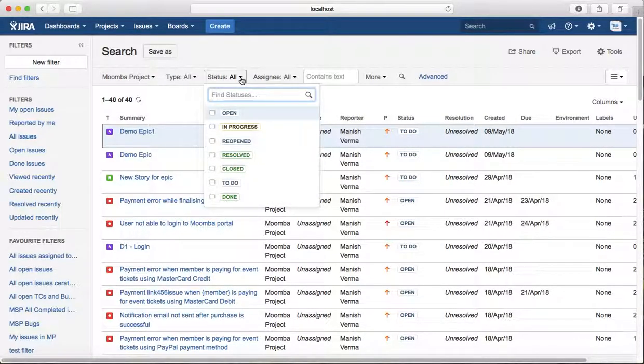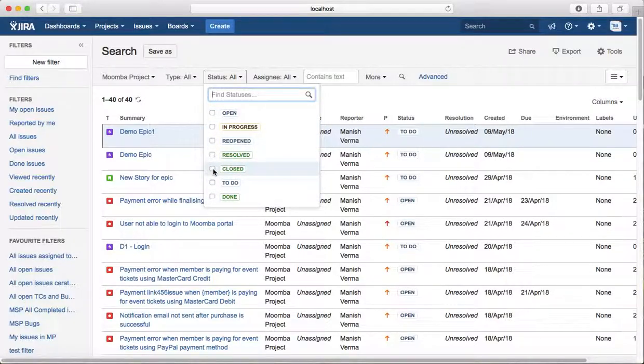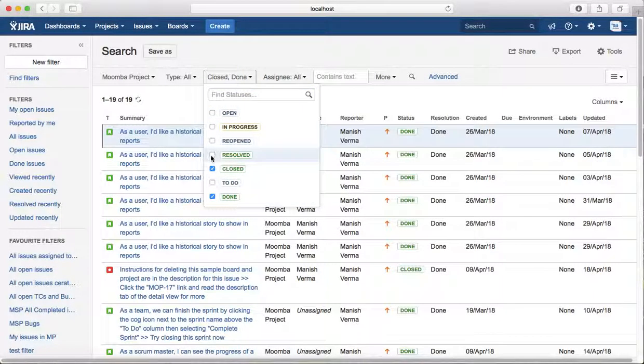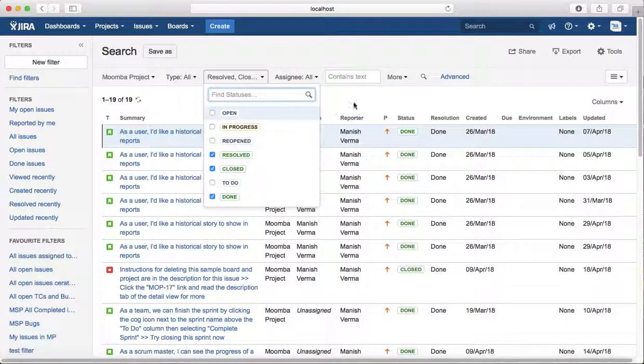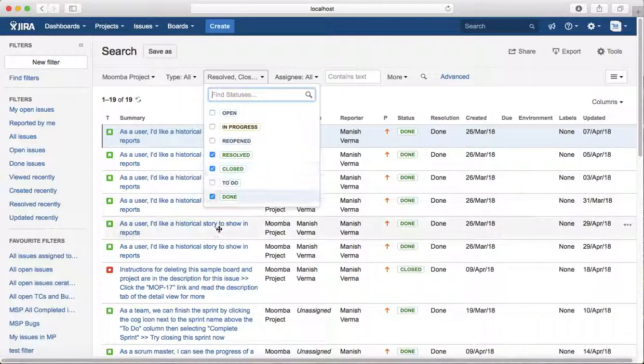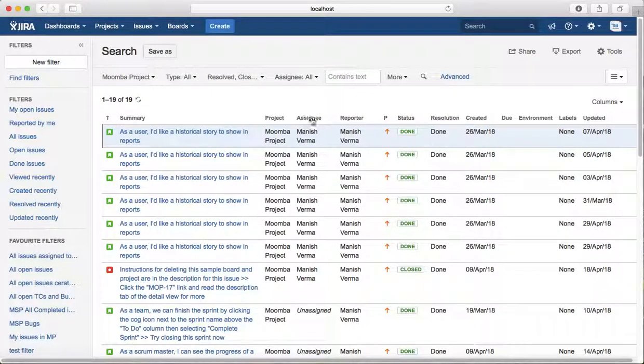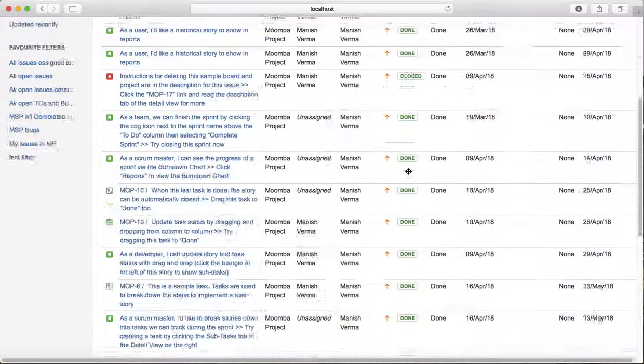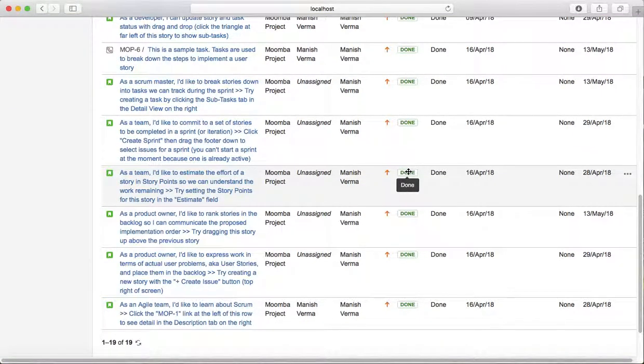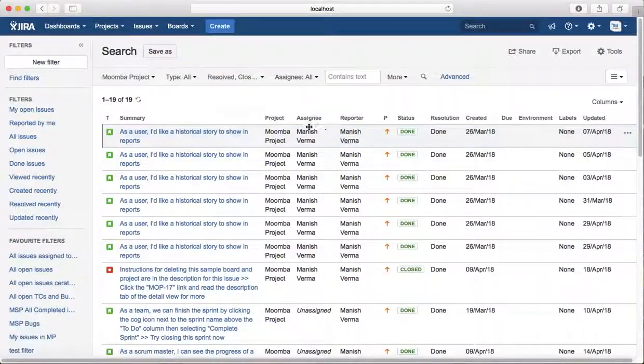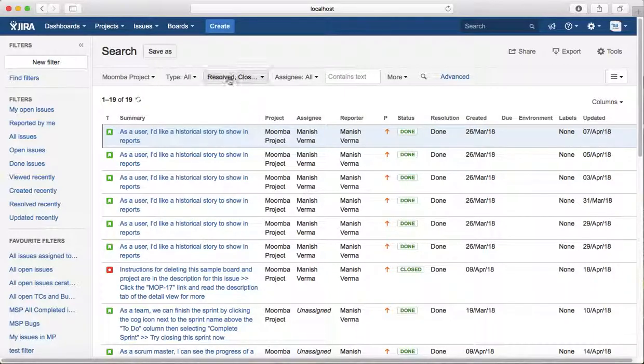Then just select the status as closed, done, or resolved. These are all done states. You can select closed, resolved, or done, and you will see the issue list being updated for the done state.